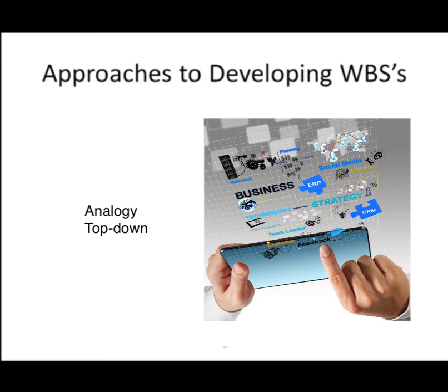The top-down approach, the one that we're going to use, here's where you start with the largest items of the project, break them down into, and this is how it was used in the previous examples, you break them down into successive smaller and smaller pieces of work until you finally get to the task that you can describe in detail.